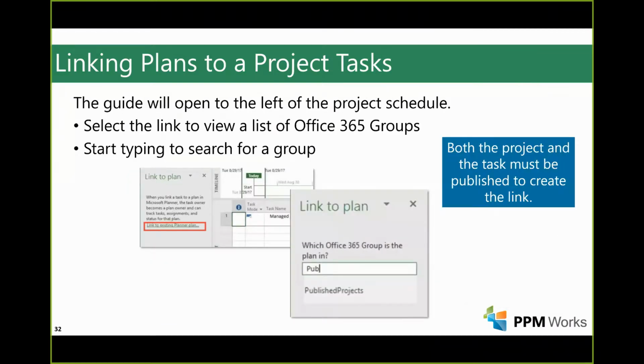Now, when you go through this, and we'll do this in just a minute, you're going to go through and manage your project. We'd have to open it up. Big lesson learned, okay? It's actually not going to let you do it unless you create your project, you create your task, and you publish the project. So you need to publish the project, and it has to have a task on it. Go out and publish it, make sure it publishes.